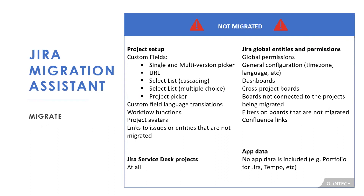When migrating, users must have valid and unique email addresses — a simple thing you can check on your Jira instance today. Also be aware that user groups will be merged and project IDs can clash, so you'll need to account for those when planning your migration. Glintech can help with any of these scenarios, whether using the migration assistant or needing a more complete custom migration approach.